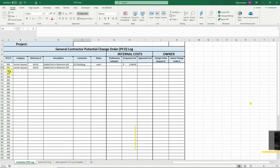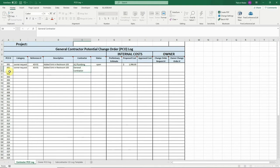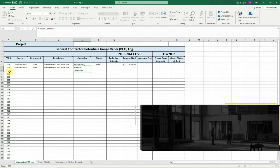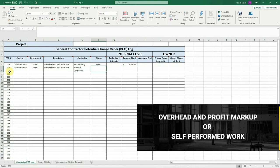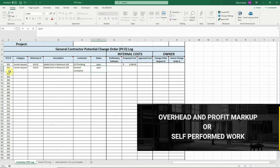The contractor is any contractor associated with the change. Many PCOs will have multiple contractors associated with them. When this is the case, just create multiple rows for a single PCO number. When you have your own company costs like overhead and profit markup or self-performed work that you as a contractor are performing, you may create a line for your company as well. This way you can see your own costs associated with each PCO along with your subcontractor costs.